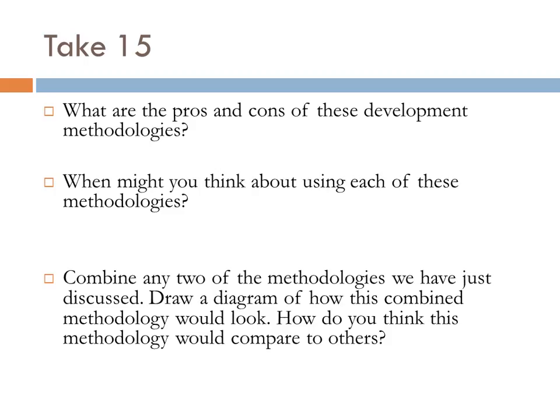Mike? I mean, basically, structured methodologies are only good when you know pretty much exactly what you're dealing with, and there's really no curveballs. I guess it has to be a really simple project. You have to know exactly what you're doing. Very important. The agile methodologies are better for more complex projects, where there's more uncertainty.